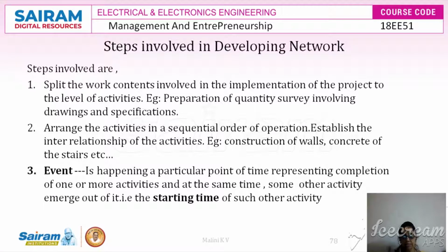An event is something happening at a particular point, representing the completion of one or more activities at the same time. If the concreting is done, it is left for some time for curing, and only after this will they remove the material used for the construction of the pillars or any kind of columns. So a stipulated time is given to the curing, and only after this will they remove the structure that was developed for supporting the concreting. Some other activities emerge out of it, and that is the starting time of such other activities.